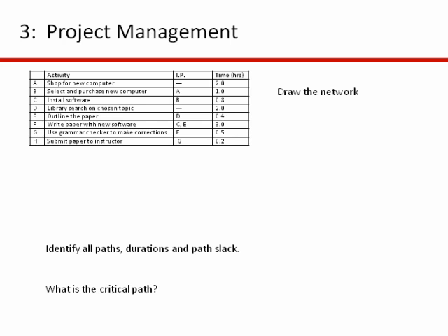Okay, so let's see if we can draw the network. All right, so this is sort of trial and error. What you would do is look for any tasks that do not have an immediate predecessor. The 2 tasks that do not have an immediate predecessor are task A and task D. So the first tasks I'm going to put here are A and D. Task A has no immediate predecessor and task D has nothing before it. The immediate predecessor to task B is task A, so task B follows task A. And so we would put B here. And then C comes after B.